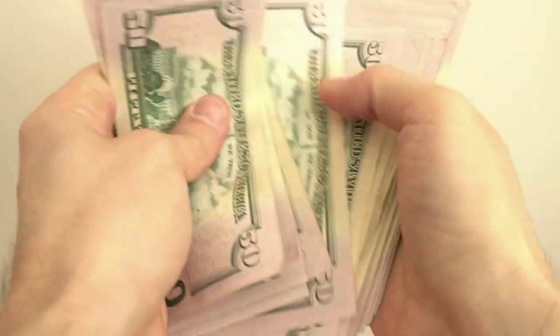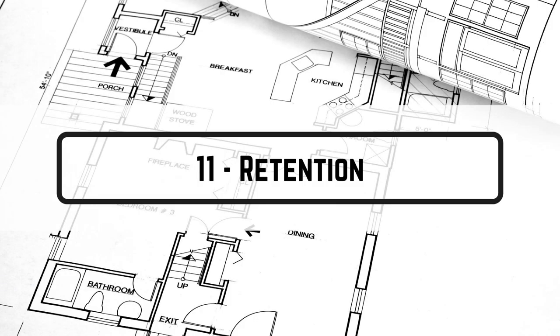Term number ten is progress payments — the payments made during execution depending on the progress of work. In the contract you should agree the time of payment: weekly, bi-weekly, monthly, or milestones. You also need to agree the certification time, meaning from the date the payment application is submitted, how long is needed to certify the payment and issue the payment certificate.